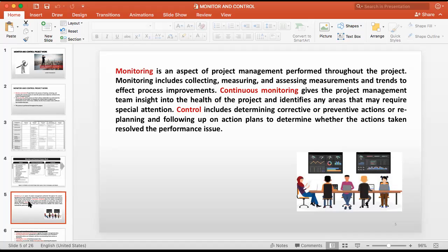So the monitoring part is very important. Continuous monitoring is very important to take decisions. Otherwise, without your knowledge, sometimes there will be schedule overruns, cost overruns, and if you are handling contractors, they will put some big claims because of your lapses and your delays. They will take advantage of putting in claims. These claims come sometimes in millions, sometimes billions. So this time, when the foreign contractors come, it will be in billions. So we have that experience also. So you have to be very careful as the project manager.